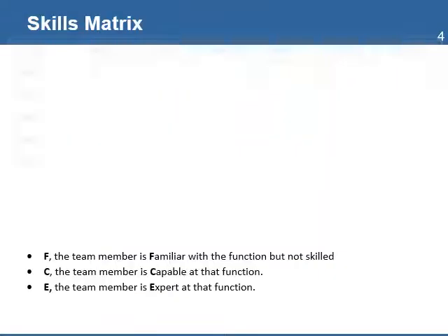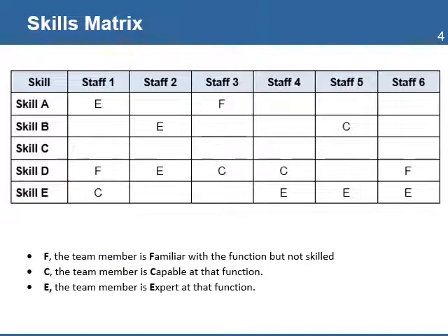the project. A useful tool to identify the level of expertise of all team members is the skills matrix. It is a useful tool to identify the level of expertise of all team members and to identify whether the skills required by the project are balanced enough. This matrix is used in the development of the team training plan and can serve as a baseline to monitor progress.